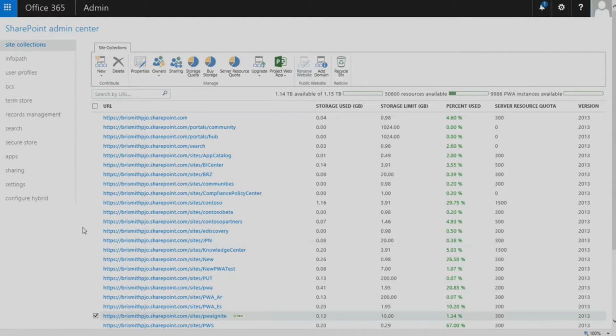I should be. OK, so here in that section, when you expand the settings for that site collection, you should be able to switch between SharePoint permission mode and project permissions mode. So that's the second step. So first step, you purchase the licenses, you assign the licenses to your users, and then second step, you create your project web app or web apps if you want to create multiple apps.